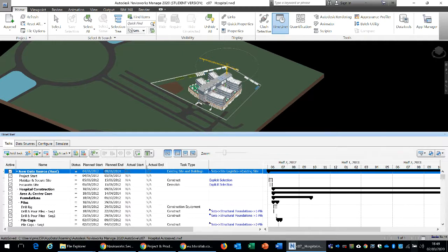Now it's also possible to use some sort of color coding. If we are running behind schedule, this could indicate, using the traffic analogy, the tasks that are in the red zone, or if it is within the planned zone, it would be green. So we could have maybe planned and tracking Gantt charts, as we previewed in our previous session.